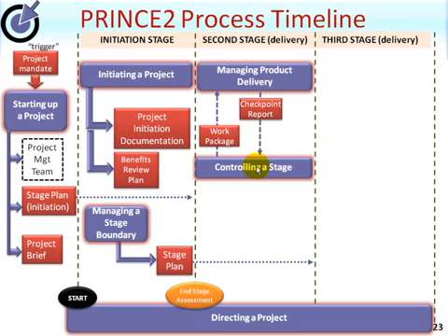By the same token, at an end stage assessment, when the next stage plan was approved by the project board, they will have advised the project manager how often they want to be kept informed during a stage. And the mechanism for the project board is called a highlight report, generated by the project manager, typically monthly, although it may be another time period, to keep the project board informed on the progress within the stage.